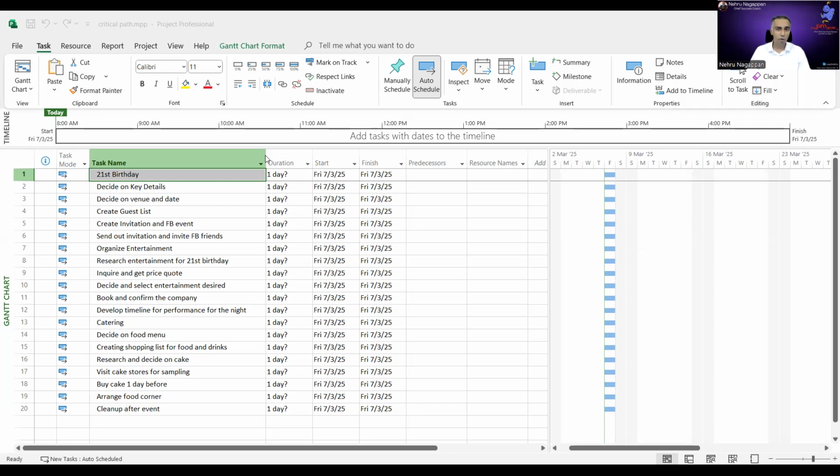If an activity is more than 10 days, it is recommended for you to break it down into a smaller one, to level 4. We call it the 8/80 rule, right? 80 hours is considered 10 days, and 8 hours is considered 1 day. So if it's within this range, stop at that level. Otherwise, you break it down further. That's a rule for WBS.